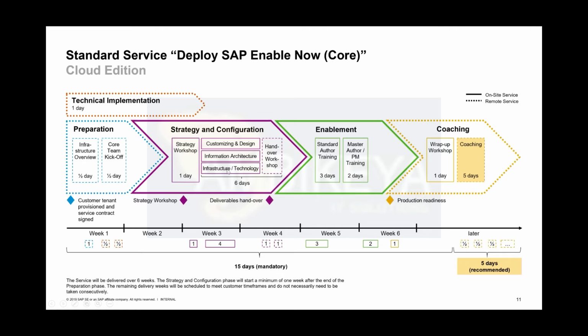And here you might take advantage of our technical experts as well, who are intended to deliver the technical implementation portion. So that's the 3 streams that more or less run in parallel, depending on the complexity of the customer's project, and this could just happen in a series of workshops that are not strictly separated from each other. You will probably not be able to clearly state, now the strategy workshop is over and now we're going to start working on the customization.